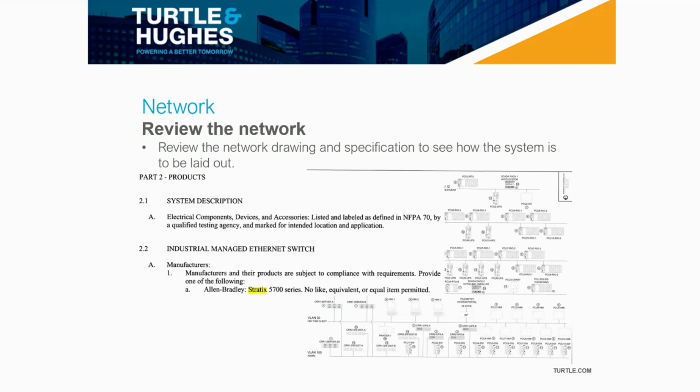This is kind of a nice spec because it says no like, equivalent, or equal item permitted. You don't run into that too often on public bid specs, but because of an installed base, they wanted to keep everything the same, so they actually put that in the specification.